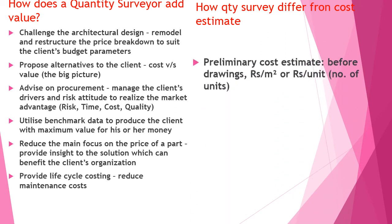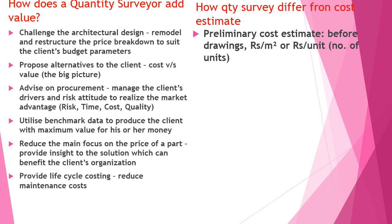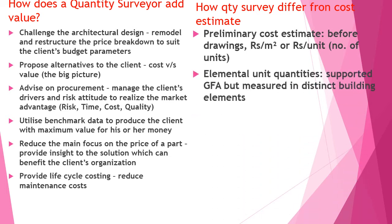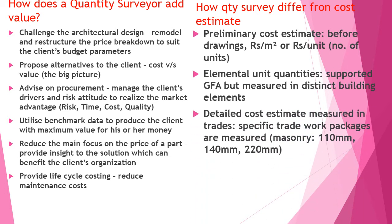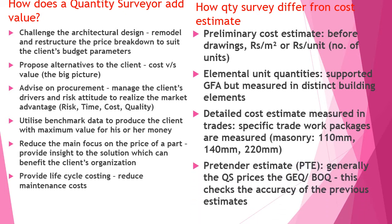Quantities are very different from a cost estimate. A preliminary cost estimate before drawing is expressed as rupees per square metre or rupees per unit. Elemental unit quantities are supported by GFA but measured in distinct building elements. A detailed estimate covers specific trade work packages, measured by masonry types of 110mm, 140mm, 220mm, etc. A pre-tender estimate generally prices the BOQ and checks the accuracy of the previous estimates.